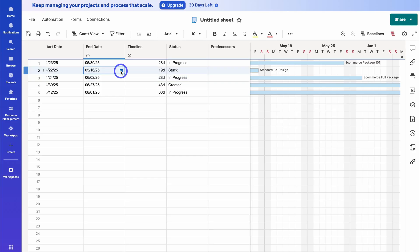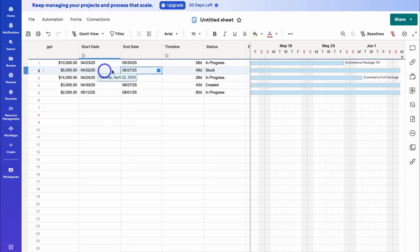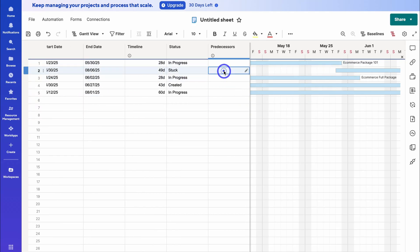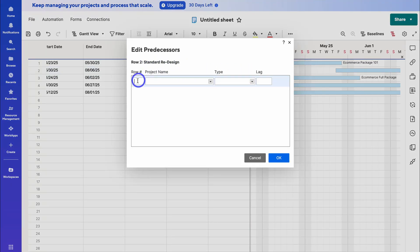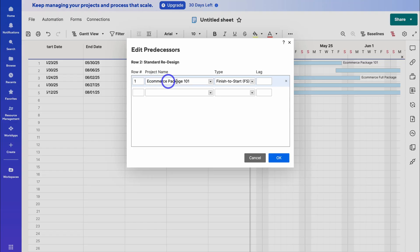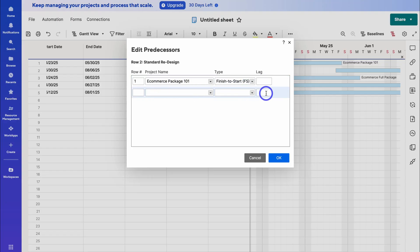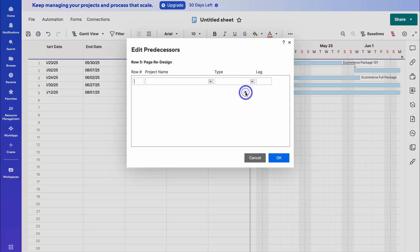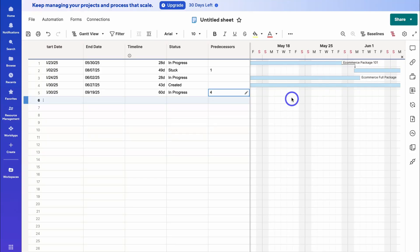I'm going to change the end date of this row to June 28th, and the start date of the next to May 30th. Now if we navigate over to the predecessor column, click the pencil icon — row two 'Standard Redesign' is dependent on row one. The project name 'eCommerce Package 101' is row one. This is the most common finish-to-start dependency: when row one is completed in terms of end date, we can start working on Standard Redesign. We can also add a lag if we want. Click OK, and you can see the arrow on the Gantt chart indicating that once this project is complete, we move on to the next. I can do the same for other rows as well.